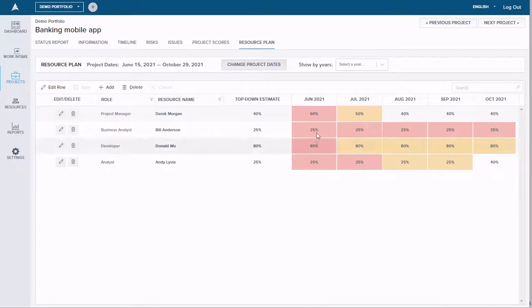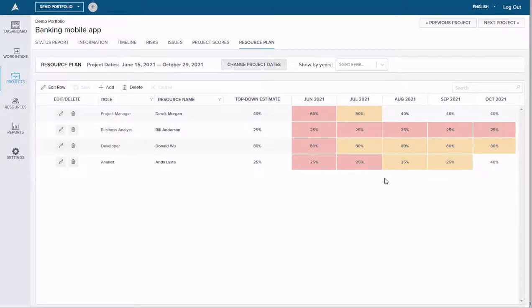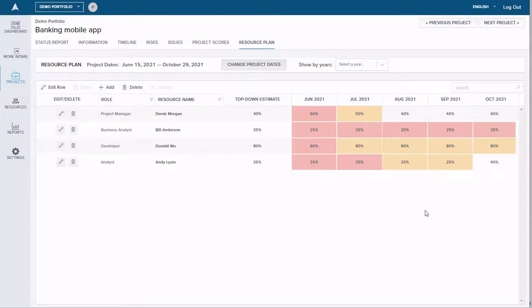As a result, we can see from this resource plan that it's not realistic in the month of June. Even if this was the number one project, there are other competing projects that these four people are assigned to that could make it challenging to get work done. This helps us answer the question: can we realistically deliver our projects? In later months, some resources are simply at risk — they're at 100% utilized, but at risk if they take on any more work. In other cases, there are months where they're not overutilized, so they're readily available.